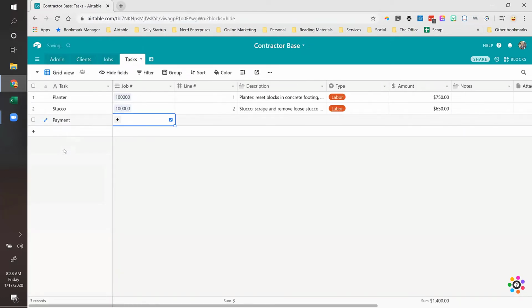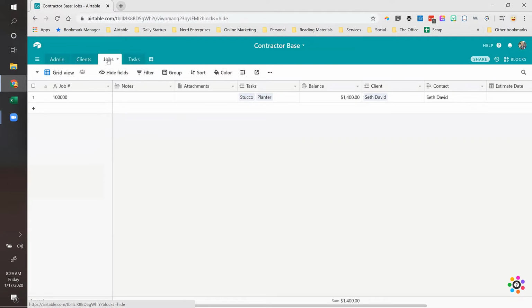Can you make it dependent on whether you check the box? You can filter things so that it will only include things that are checked off. Yes, that's a little more complicated, but what I ended up doing instead on mine was that the things that weren't selected, I changed the job number so that it wouldn't accumulate for those. That was an easier way to address that issue. So basically what I did was I took the same job number if it wasn't selected, and I called it like 100,000 dash space NA. And that way anything that wasn't selected got assigned that job number.